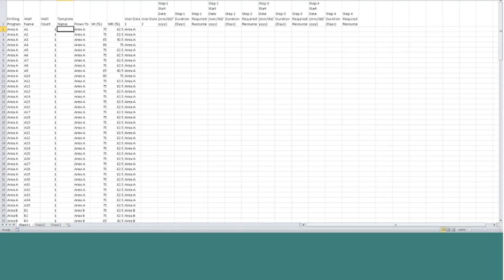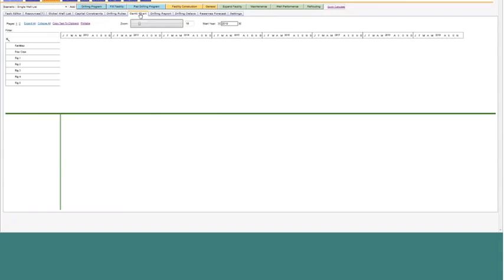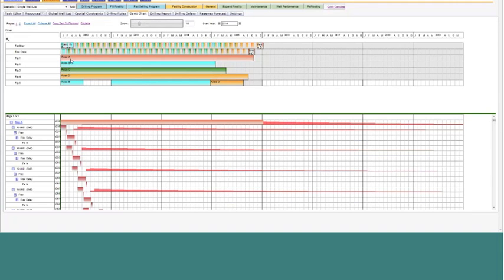And so when I come back and I run this program the same way, I'll see that I get the exact same thing. If I go look at my Gantt chart, my rigs are set up in the same exact way, so they target individual facilities, and then the fifth rig targets B and then goes to target D. So when I look at my Gantt chart, I see that I have the exact same thing: rig 1 targeting area A all the way down to D, and then rig 5 targeting B and then going to D when it's done with area B.